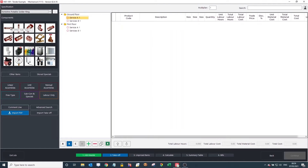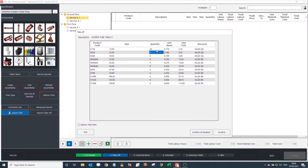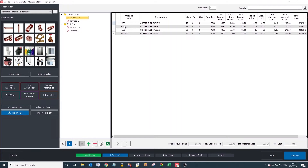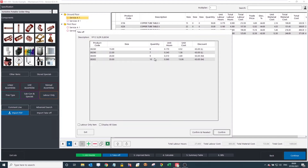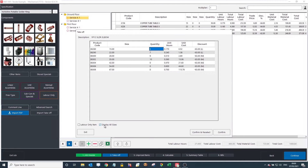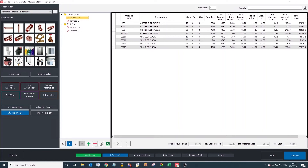Now to actually input a couple of items: I've got my copper tube, I give that a press, and it comes up with all my different relevant sizes, the set labour times, and my net rates created from list price minus my discount. To input them onto the job, I just come to the quantity box and input how many metres of the relevant pipework I need, hit confirm, and it's now been added to Ground Floor Service A. A really nice feature is that it will remember what sizes we've just used, so when you click on bends it will only show you the relevant sizes.